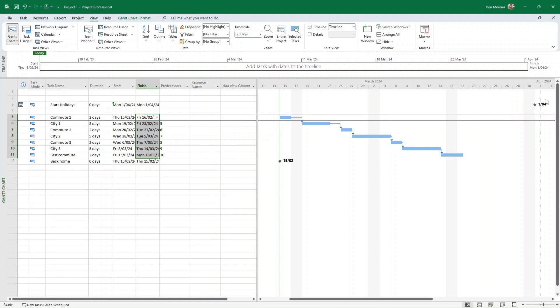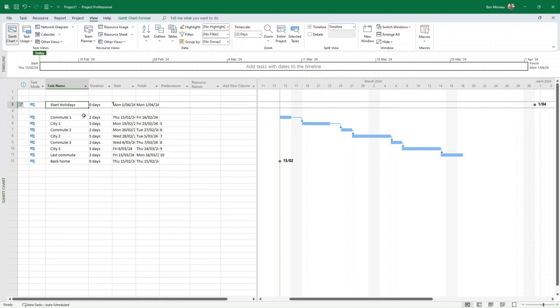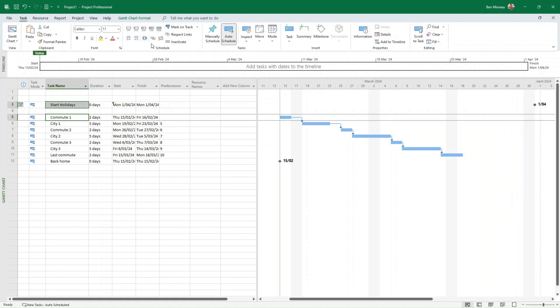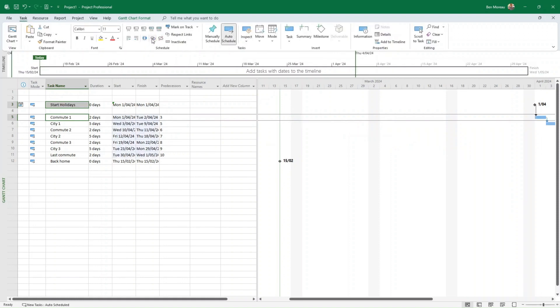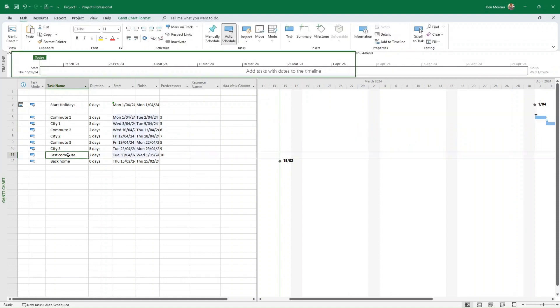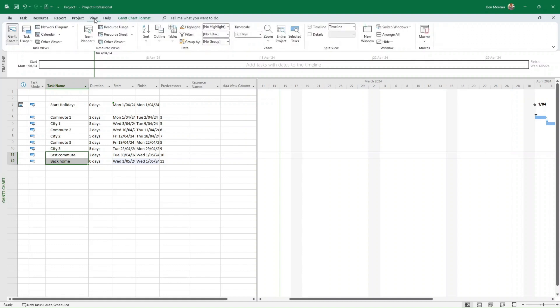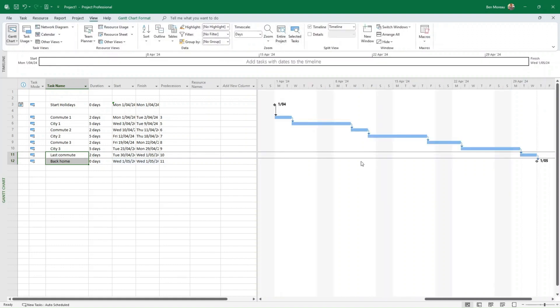Now the two milestones are still hanging, so this is wrong because they need to start after the start of the holiday. So we just need to link those two. So still by pressing control key, I can link those two, I go back under my Task, and I press Link. And the back home, I press the last task this time to make sure that it's all sequential, and I press the Link. I go back under my View and I just put entire project and everything is there.